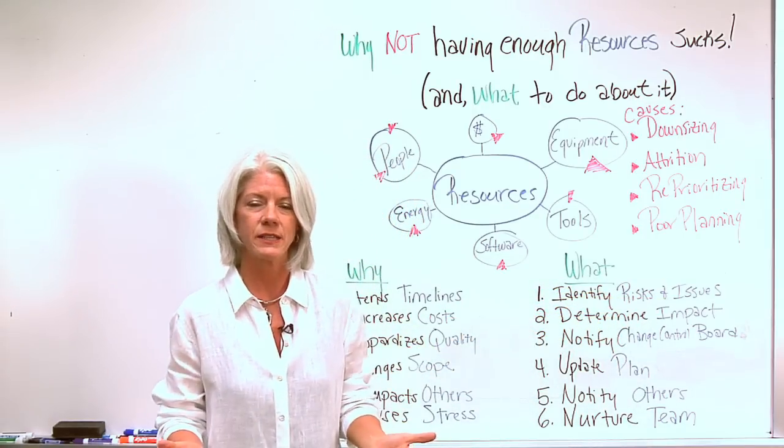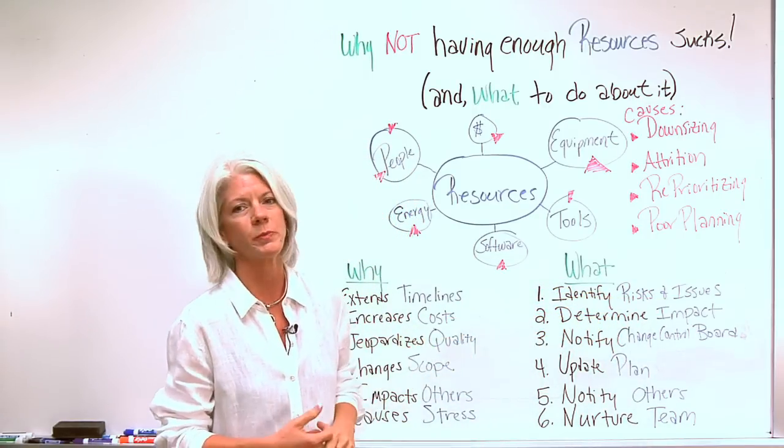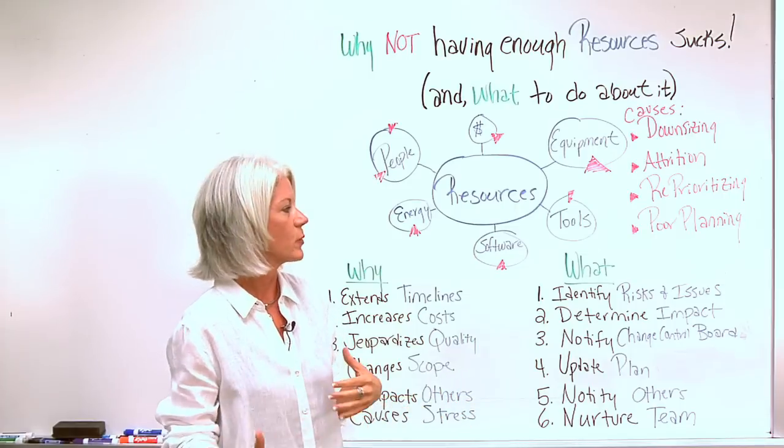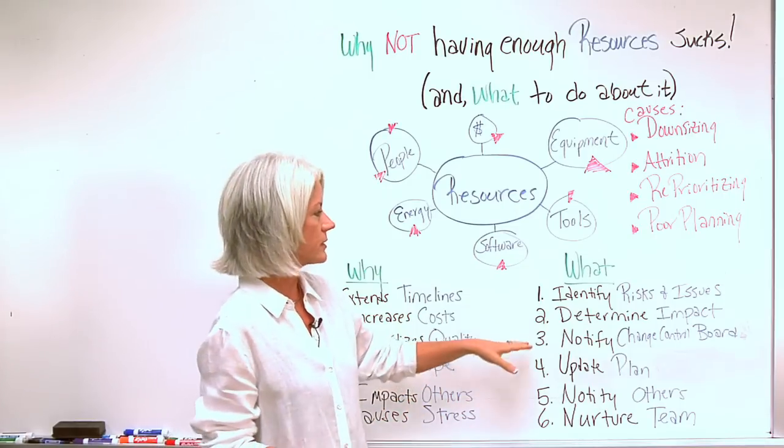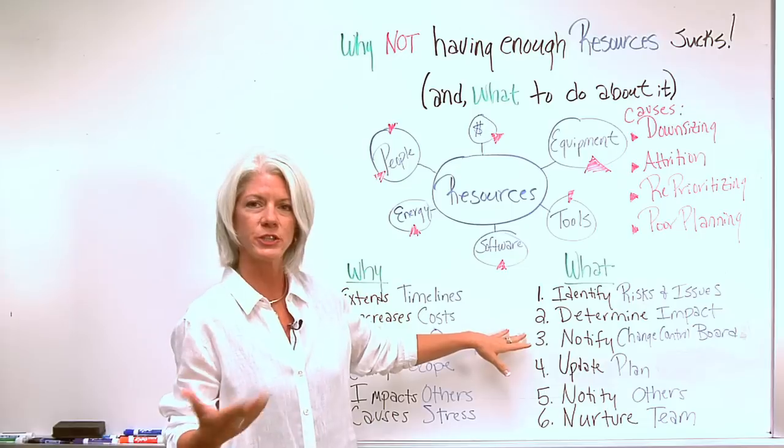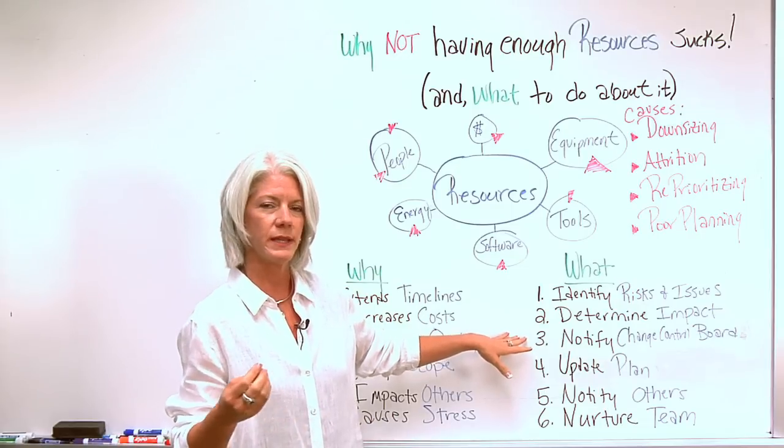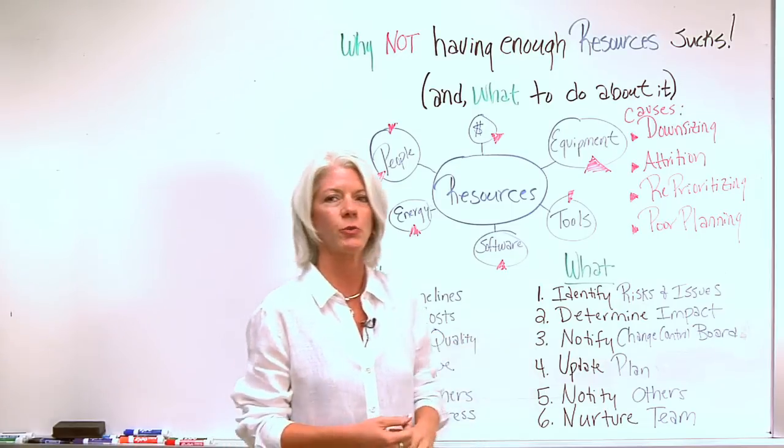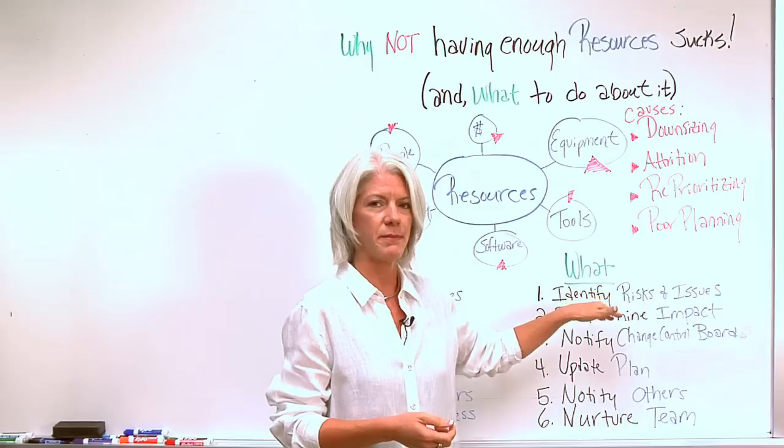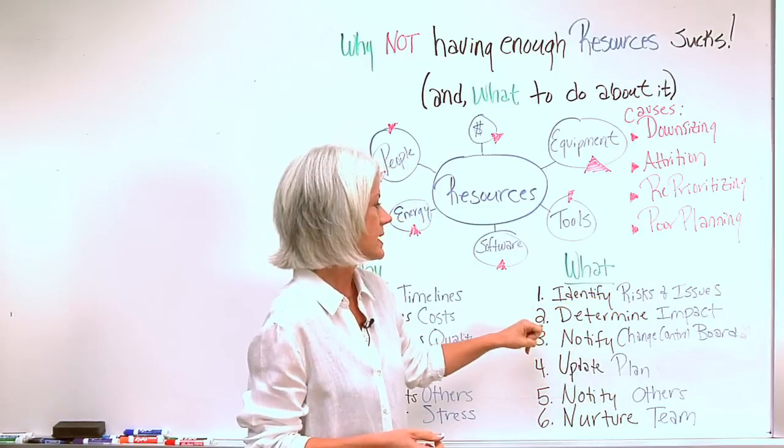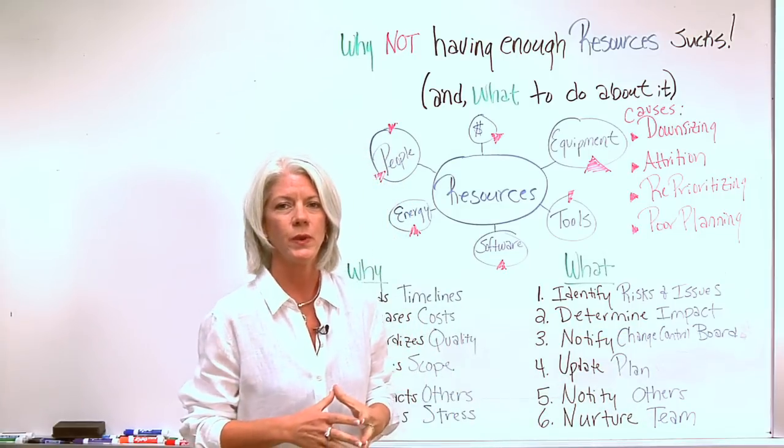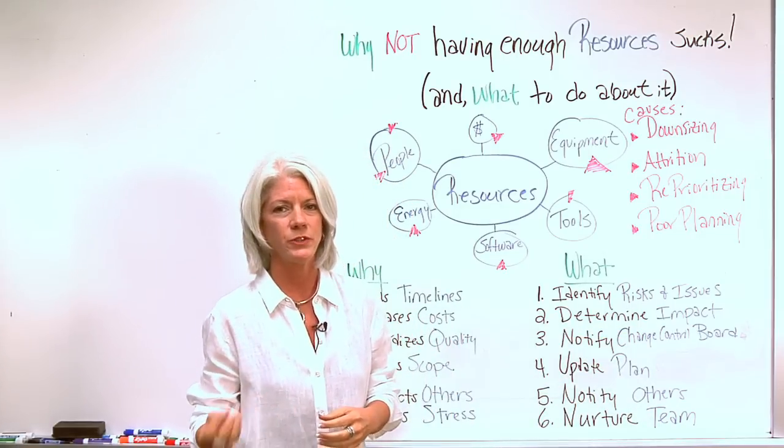Determine what impact it's going to have. Remembering the triple constraint that we're responsible for - changing in one of the components is more likely going to change the others. So determine the impact and go to the change control board. It's good to let them know you've already identified how it's going to impact and some of your recommendations, but ultimately leave it to the change control board to determine what they're going to do with that information.